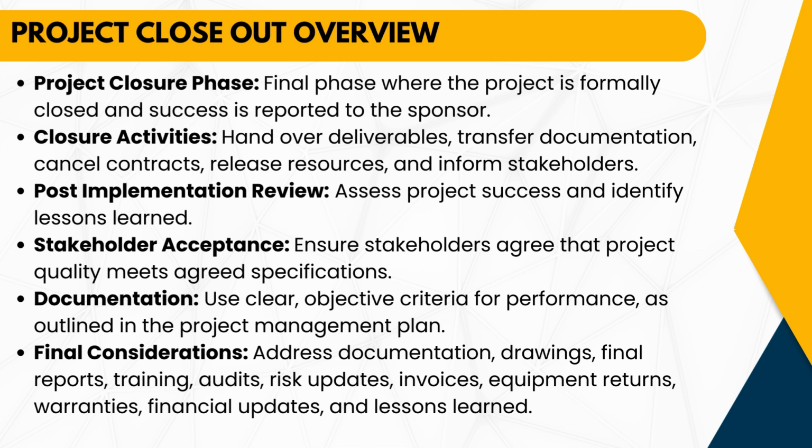Then the final consideration, this is where you address documentation, the drawings, if it was perhaps architectural, or you needed draftsman drawings of some nature. The final reports, remember you are reporting all throughout your project, and now at the end of the project you've got your final report to say this is what happened and we are done. Your financial updates, my apologies, I've skipped a little bit. So you also want to have a look at the training, the audits, the risk updates, the invoices, equipment returns, the warranties, and the financial updates, as well as the lessons learned.